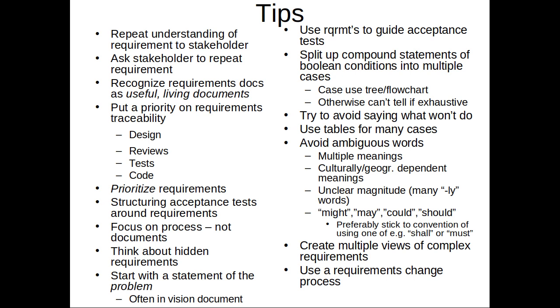UI tests often have as a key component the fact that they test use cases. They test certain functionality. And if you change that functionality, you will probably have to redo some of those tests, rewrite them, alter them, write new tests for the new functionality. In any case, tracing or keeping track of which tests and which code and design stem from which requirement is a laudable practice. This is not something I absolutely require. But it's good with a capital G.